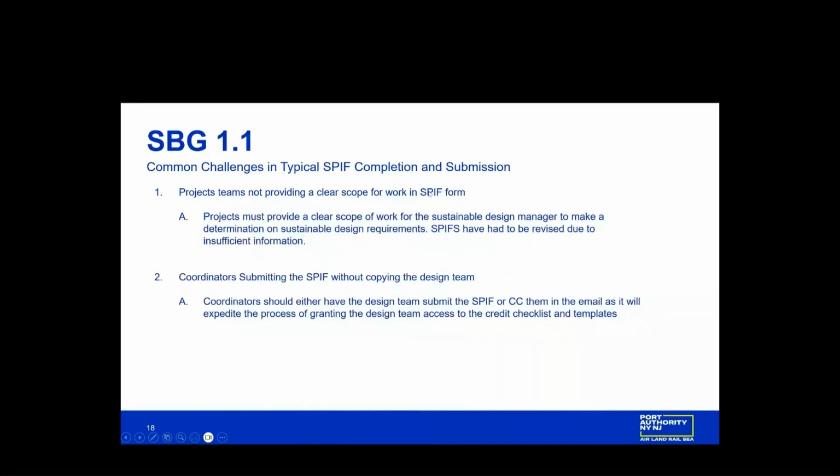Next slide, please. So the common challenges in the typical SPIF completion is the project teams do not provide a clear scope of work in the SPIF form. Projects must provide a clear scope of work in order for the sustainable design manager to make a determination on the sustainable design requirements. This often has to be revised due to insufficient information.